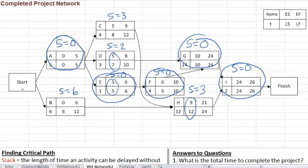And notice that if you connect the critical activities by following the arcs in the network, then we get an entire path from start to finish. And that path is called a critical path. So that would be going from start to A, and then to E, and then to F, and then to G, and then to I, and then we're done. So that's the critical path. So critical path here, from A to E, to F, to G, to I. So that's your critical path.